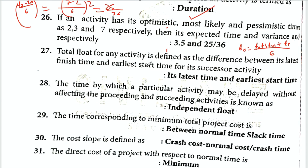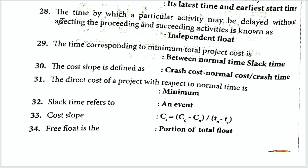Total float for any activity is defined as the difference between its latest finish time and its earliest start time. Independent float is the time by which an activity may be delayed without affecting preceding or succeeding activities.